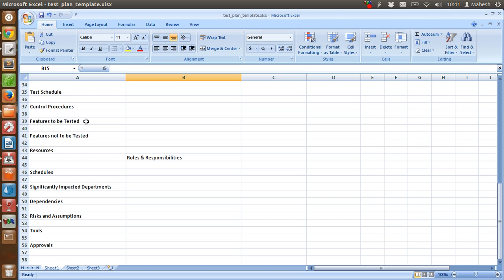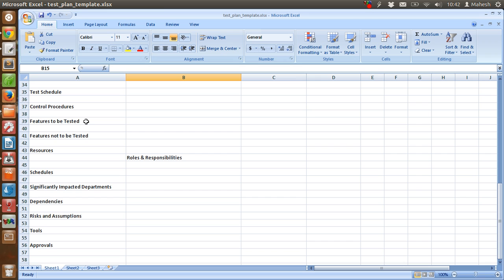After that, risks and assumptions - we have to identify the high risk assumptions of test plan, then contingency criteria for this plan as well. After that, we are going to check the tools that we need to carry out the test, and then approvals. We are going to specify the name and title of all the people involved in the testing and who are going to approve the test plan, provide the space for signature and date.